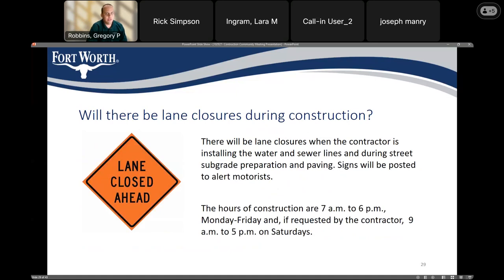When the contractor is doing work in the street, there will be some temporary lane closures. Signs will be posted to keep drivers aware that work is occurring. Hours of construction are between 7am to 6pm on weekdays, and if requested by the contractor, 9 to 5 on Saturdays.